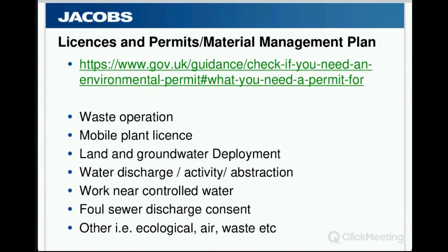Quick note on licenses and permits. Make sure early on in the optioneering that you start to think about what permits, what wastes and what waste management licensing are going to be required, and the contractor accreditation. There can be significant delays in a project if these aren't addressed. My experience is that you're in a queue, and a resubmission for a rejected license or permit won't get you to the front of the queue, and quite often I've seen a number of projects delayed because of inappropriate licenses and permits or incomplete material management plans associated with earthworks.